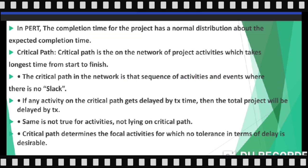Critical path is the path on the network of project activities which takes the longest time from start to finish. Critical path is that path of the network diagram or precedence diagram which gives us the project duration — it is the longest duration from start to finish. Let me draw a network to illustrate.